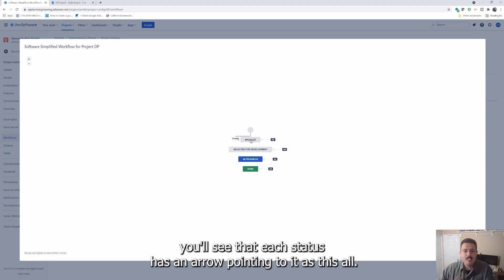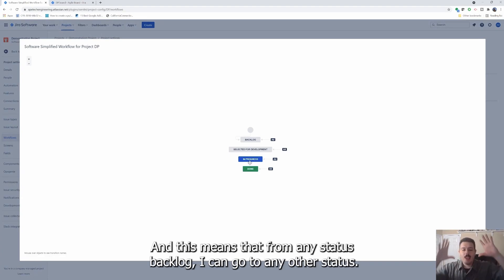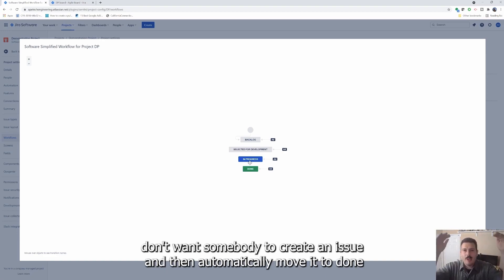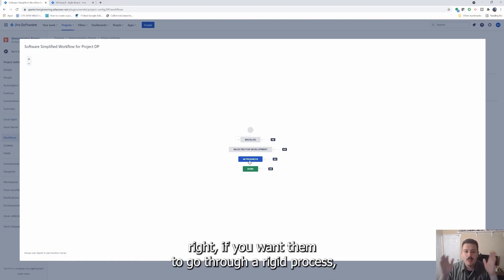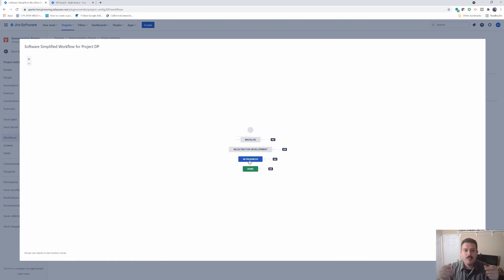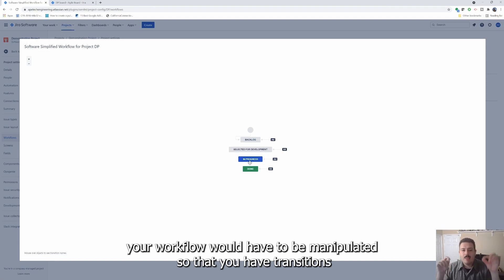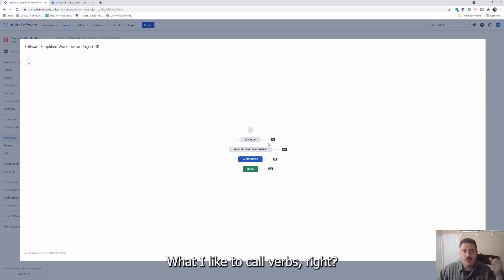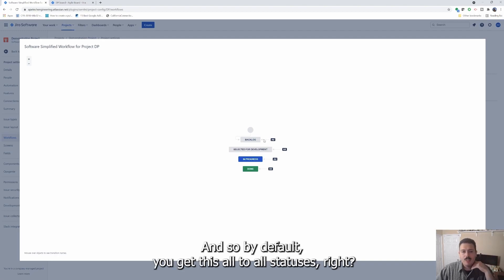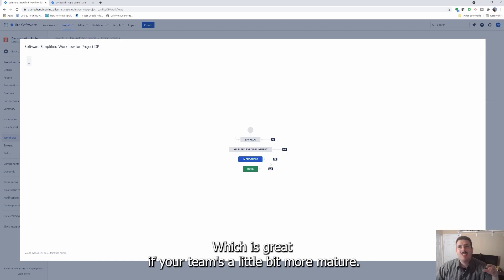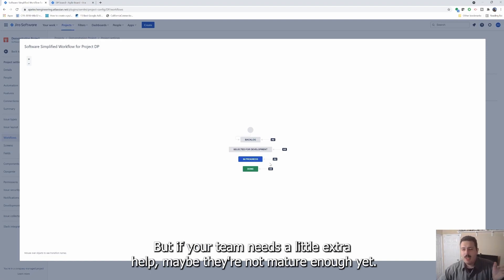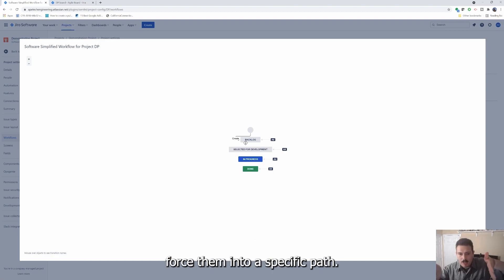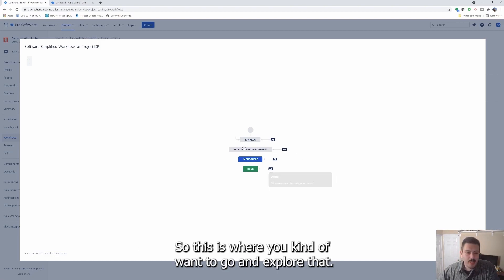So when we look at the diagram, you'll see that each status has an arrow pointing to it that says all. And this means that from any status backlog, I can go to any other status done. And so if you don't want somebody to create an issue and then automatically move it to done, if you want them to go through a rigid process, your workflow would have to be manipulated so that you have transitions between each of these statuses. So each of these rectangles is a status and the arrows, what I like to call verbs, it's what you do is the transition. And so by default, you get this all to all statuses, which is great if your team's a little bit more mature, but if your team needs a little extra help, maybe they're not mature enough yet, or maybe the trust is just not there yet. You can definitely force them into a specific path.